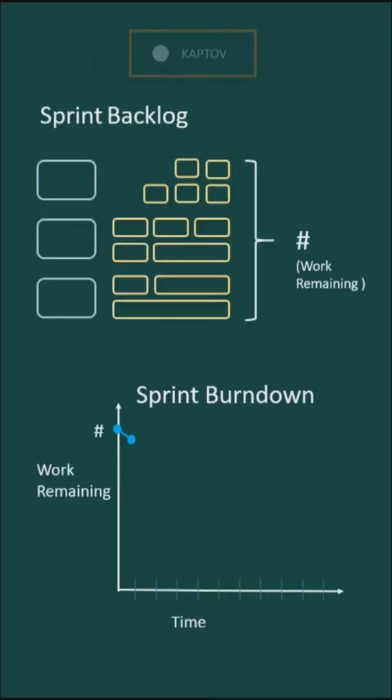Now let's carry on. Let's do a couple more days here. It won't take long to figure it out. So say day 2, the team gets some more work done, but actually they discovered more work in those upcoming PBIs. I don't know if you noticed that. We added more work, but we also got work done, and really we got the same amount done as we added, right? When we say added, it's more like we discovered. The team discovered work as they were working through this, like, there's more to it than they initially thought. So we've discovered work, but we also got work done. In this case, we actually end up staying flat.